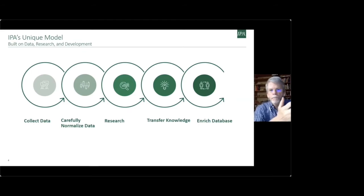And the data include cost estimate and schedule targets and scope of the projects and a myriad of other data that we collect as part of this data collection. Then we normalize the data by controlling for currency and inflation escalation so that there can be an apples to apples comparison when we conduct research. And as I said, the fundamental question of our research is what practices can we empirically show correlate and drive better project performance? Now what is better project performance? It is multi-dimensional. It can be cost, schedule, it can be predictability, and it can be safety. So once we've completed this research in various ways and over different periods of time, we transfer this knowledge via benchmarking evaluations and reports. And it's a continuously improving process where every project evaluation we conduct is fed back into the database to help enrich the database and keep things current, picking up on more current trends and seeing where the industry going and identify additional or multi-dimensions to our best practices.